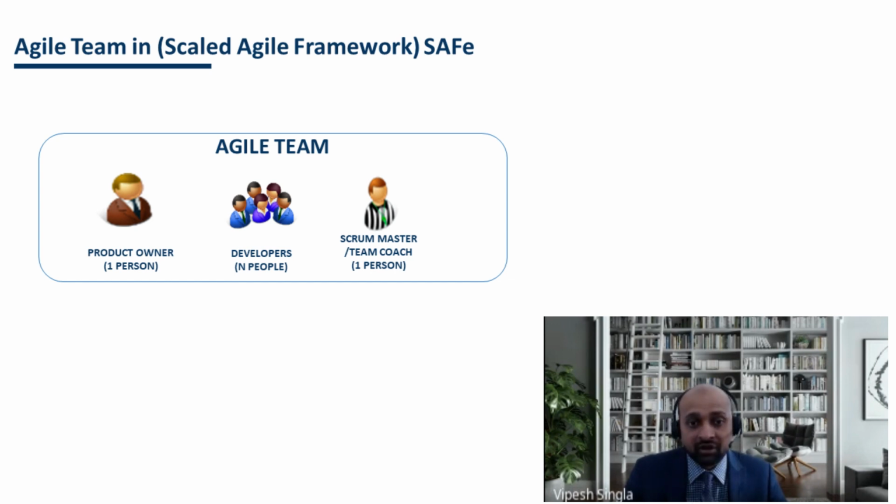But let's say you are running a team which works on defect fixing. You get a lot of maintenance work, or some kind of tickets, or you work in a support team. In those kinds of cases, you tend to use Kanban, SAFe Team Kanban, as a methodology or a framework for your team agility.